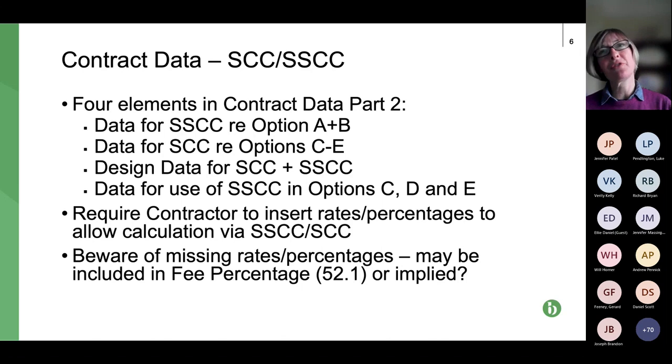I think I quite often refer to this. I once had a client who only filled its name in the schedule of the contract data part 2. None of the blank spaces for pound signs, price lists, etc. It does raise a serious issue that it makes the schedule of cost components and the shorter schedule pretty much inoperable.